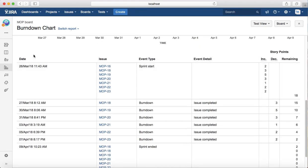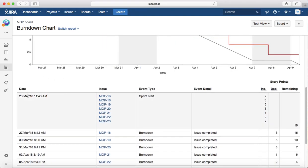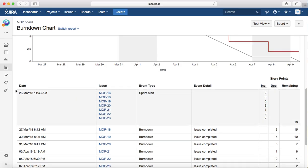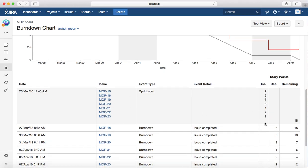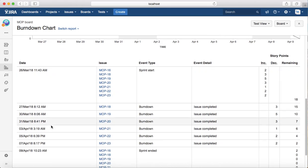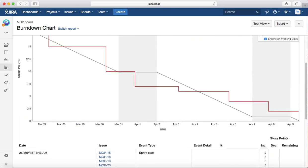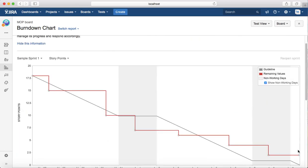If you see below, you'll see the chart here, which basically shows a table of how many issues were planned in the sprint including the story points, and then based on the date when each particular issue was completed, how many story points got decreased. You will see that two story points were still remaining.